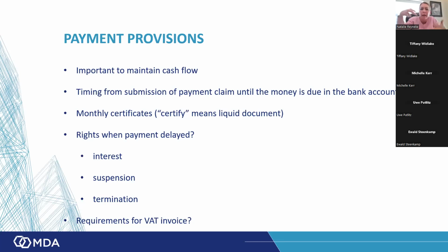Where's the tax invoice infiltrating into that process? So yeah, be very aware of payment provisions and amendments there too, adding these invoicing provisions without actually considering how they're going to fit. As the contractor, you think you have a 30-day or 45-day payment term, but if you read the provisions of the contract, from the time you submit your payment claim to certificate to invoice, and then 30 days later, you might be sitting on a 90-day payment term.